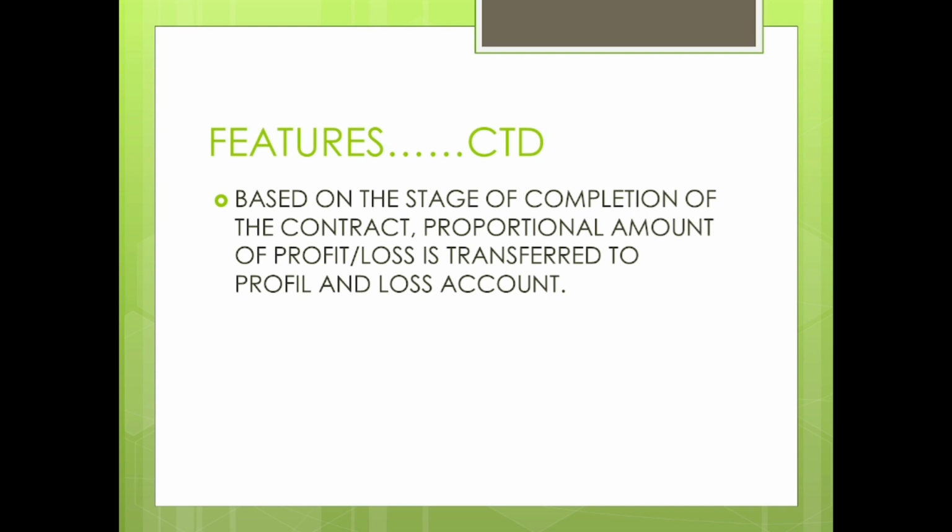Now, if the contract is not completed, how do I report my profit? Yes, I can do so. Here we have a concept called notional profit, which I will tell you very shortly. I can find out some amount of profit based on how much is my completed work. So based on how much work is completed, I will estimate my profit. That is what is written in this point: based on the stage of completion of the contract, a proportional amount of profit and loss is transferred to the profit and loss account.